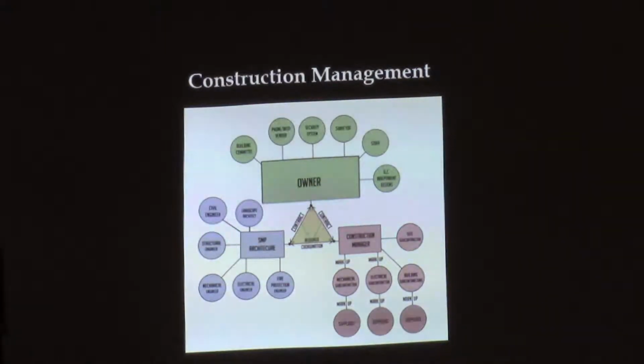And this would have a certification on it if it had been done at the same time with the same methods. I mentioned the civil engineer who will be working with us on this project when it passes, and they have a wetlands scientist who works for them in their office. They will utilize the survey that was provided, and they will also flag the areas, and we'll have a clearer, more accurate, stamped and certified plan once we move to the next level. So this is subject to change. Hopefully not.